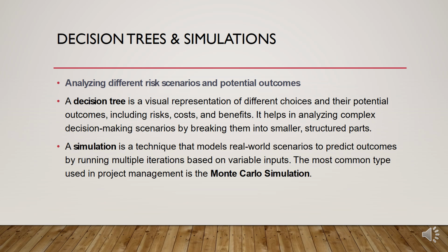For example, a construction project manager uses Monte Carlo simulation to estimate project completion time by modeling the uncertainties in task durations. The output shows a 90% probability that the project will finish within 8 months, helping in scheduling and risk mitigation.